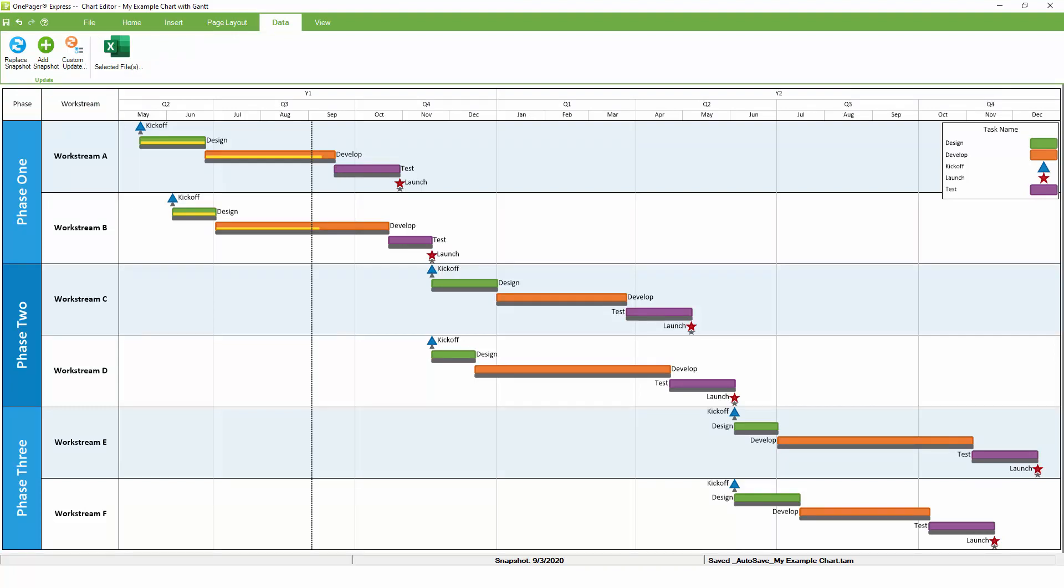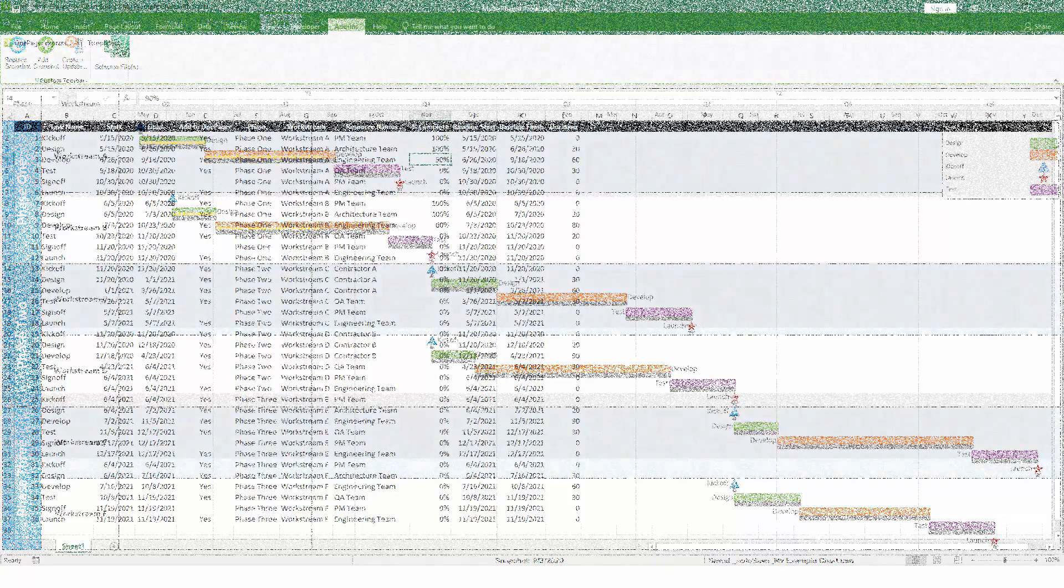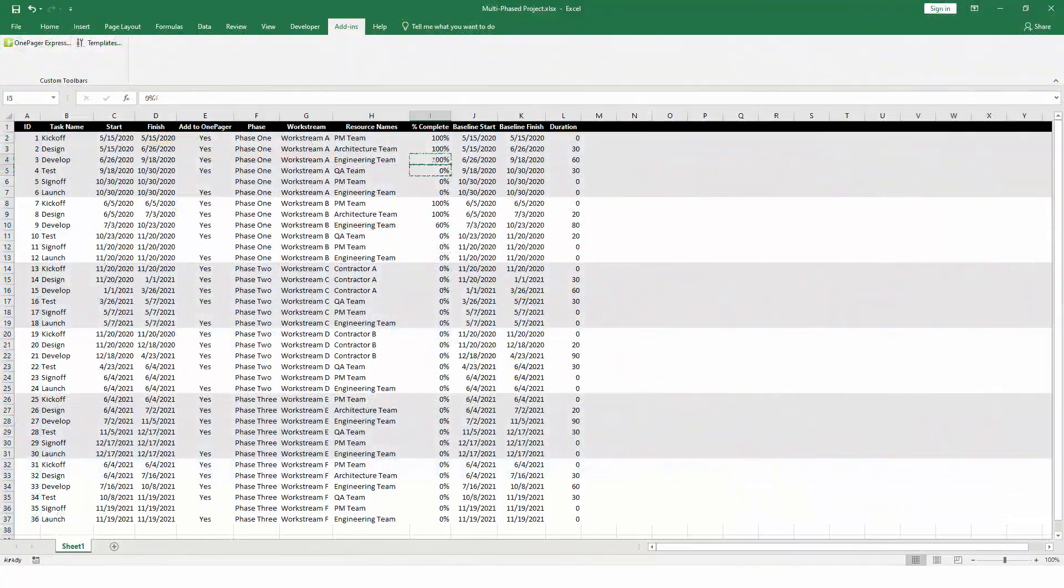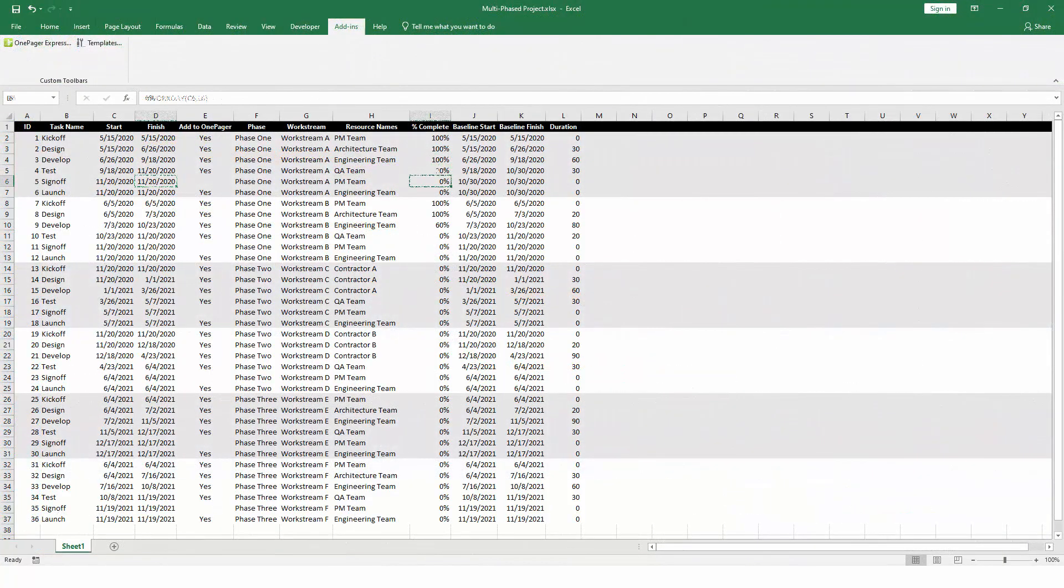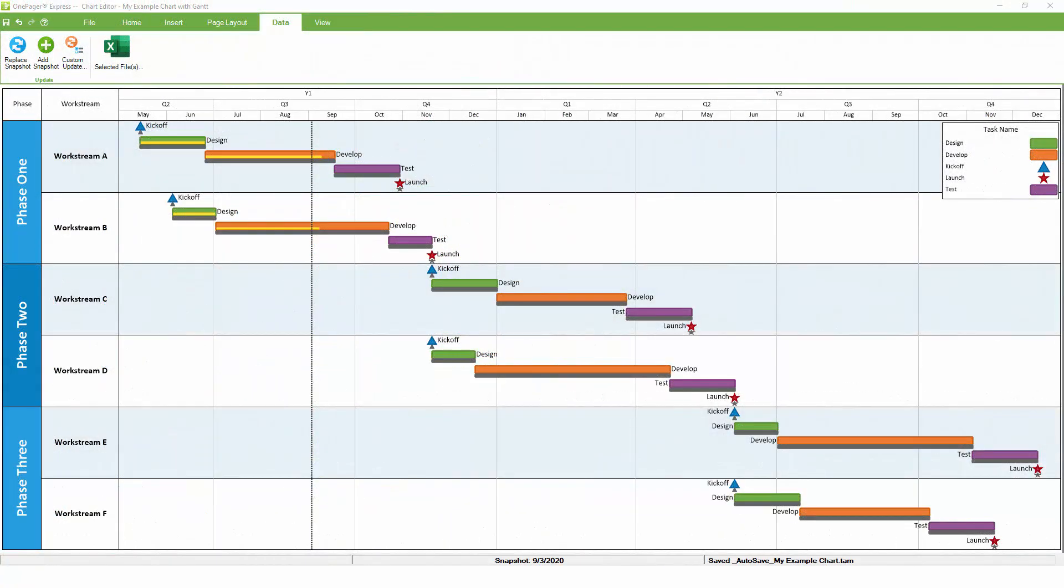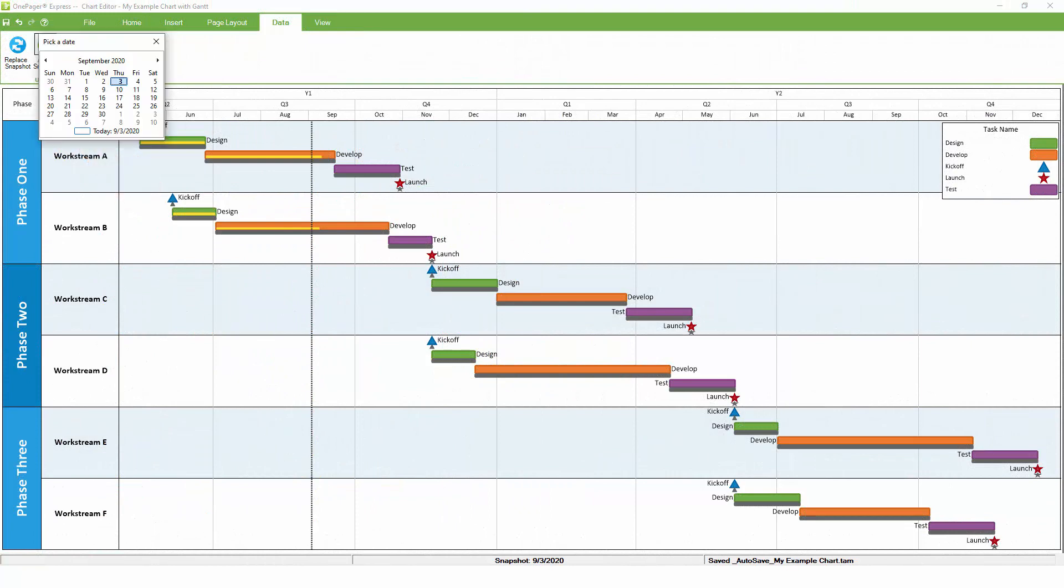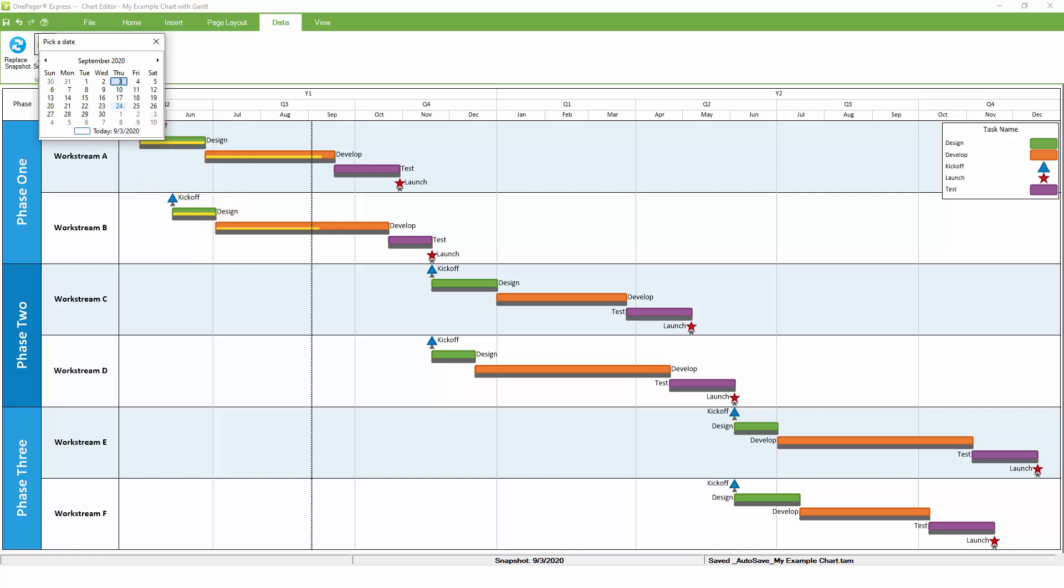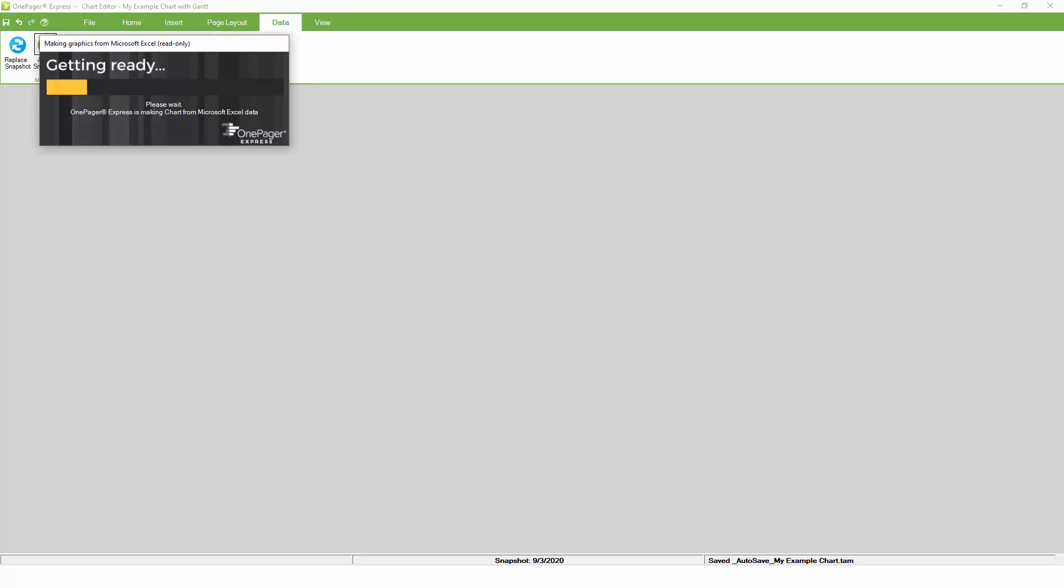This will re-import your information from Excel while preserving any formatting that you've already established in the chart. OnePager also lets you refresh your chart over time and track those incremental updates on a weekly or monthly basis. This is because OnePager supports multiple snapshots at different dates within the same chart. Remember that when we first created the example chart, we did so as of today's date. Let's go back into Excel and adjust a few tasks.